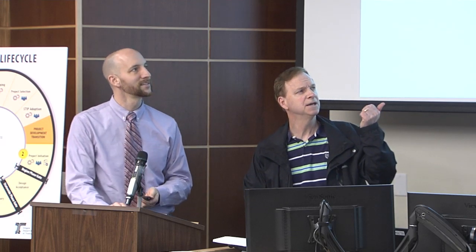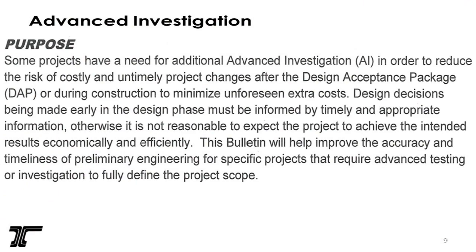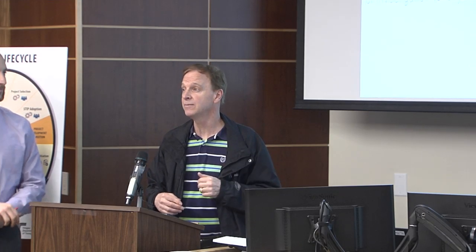Any questions on these? One, just real quick on the advanced investigation. One of the things that we found out, a lot of times what would happen, we'd be in design and we'd be maybe all the way about to DAP, and we go, oh, we just started looking at this stuff and this is going to throw this way off. It's going to delay everything. And so we started saying, well, wouldn't it be nice if we did this advanced investigation in advance of this? And so, well, go figure, that's a novel thought. And so that's what that all came about.